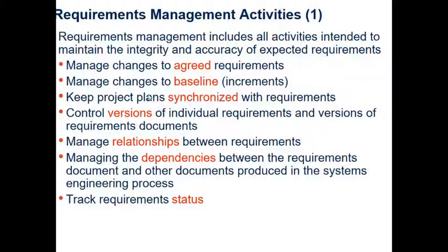So you need to keep track of all the versions of the requirements documents, and also versions of the requirements themselves as they evolve. You have to manage relationships between requirements, because they would also be changing. You have to manage the dependencies between the requirements document and other documents produced in the systems engineering process. And you have to track requirement status.